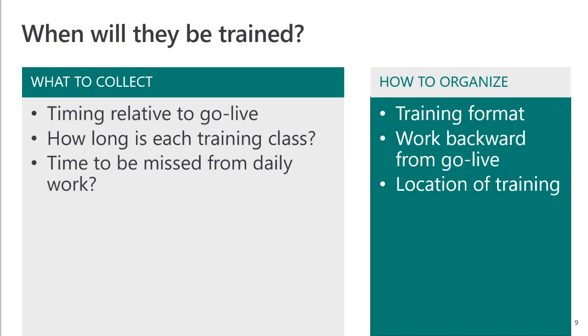and use that as a gut check. Like if someone is going to be using the software 8 hours a day and they have 40 different tasks that they need to complete in the software, and you've only scheduled 1 hour of training, that's not likely sufficient. And so you'll also want to think about when you compare back to your who as well.